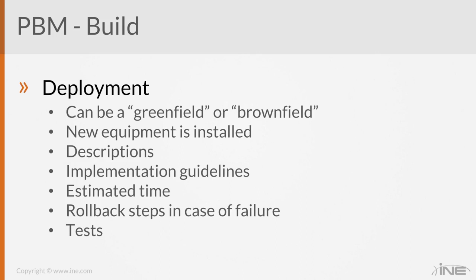Too often I see this. The maintenance window is 2 hours. It's the estimated time for the implementation itself. Well, if the implementation fails, now we're stretching the maintenance window. So we're outside of that time. So usually your rollback should fit within your maintenance window.